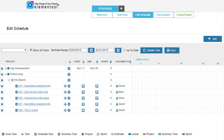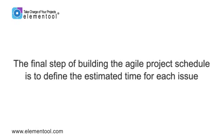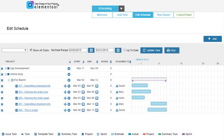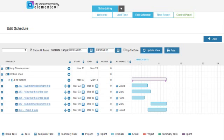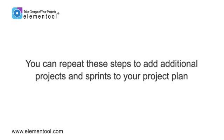Repeat this until all the issues are added to the project. The final step of building the Agile project schedule is to define the estimated time for each issue in the sprint. Use the start and end date fields to define the schedule. As you can see, the schedule of the first sprint is set. You can repeat these steps to add additional projects and sprints to your project plan.